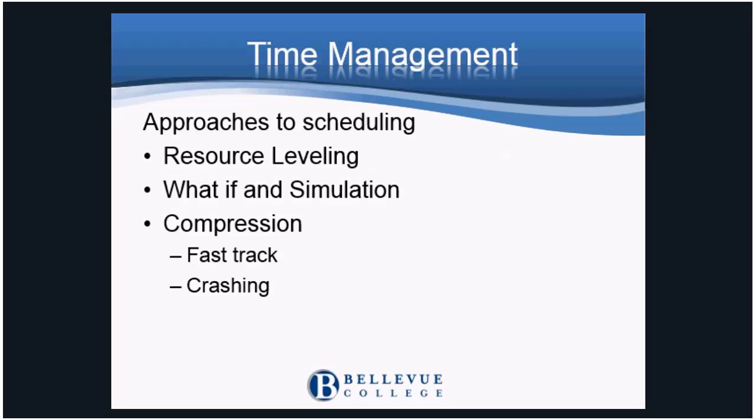One of the ways to analyze and adjust the schedule is resource leveling. If a person or equipment is double booked or becomes constrained, you can extend the schedule to remove this conflict. Another method of analysis is using computer modeling to identify resource conflicts. Some of the most common technology approaches are what-if models or computer simulations. Simulations can also identify bottlenecks.